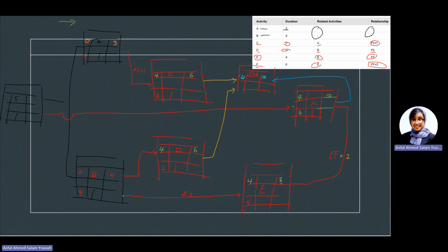Okay, so why do we have it as going back to the end? Sorry, it should not be this way. Sorry for that. I'm gonna use orange for this so you guys can see. So I'll also be having one line from my output towards the end, and I'll be putting it as 10 because that is the maximum. So why did I put it as 10? Because I have 6 and I have 10. When I'm doing the forward pass, we take the bigger number. Okay, so in here I'm going to take 10.